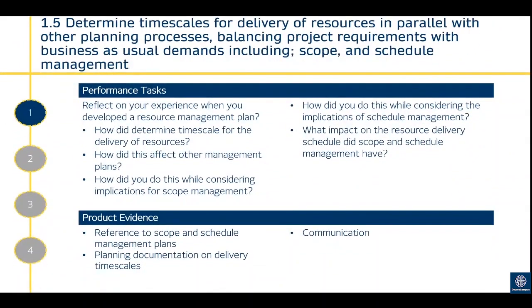1.5. Determine timescales for the delivery of resources in parallel with other planning processes, balancing project requirements with business as usual demands, including scope and schedule management. There's a link here between schedule and resources. Typically the schedule should be, particularly at the planning stage, created first, so you know when you need things, and then from that you can create your estimates and work out when you need them.